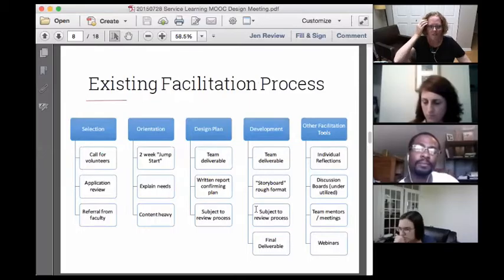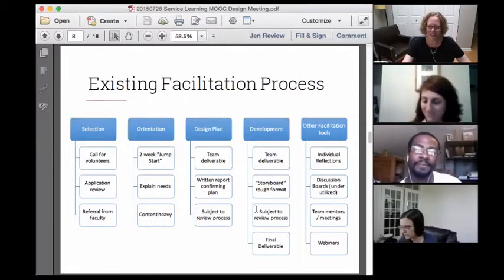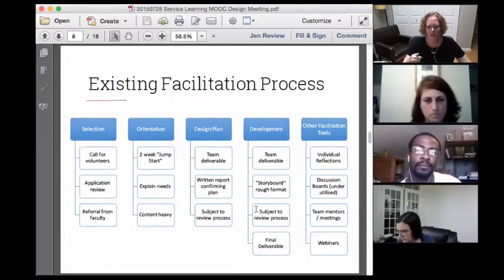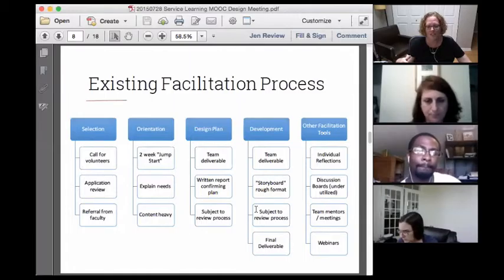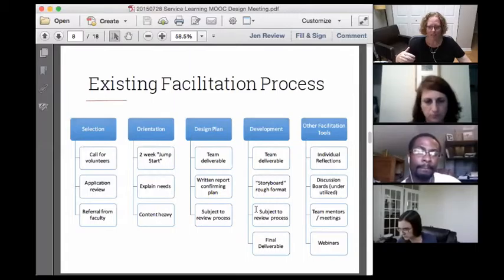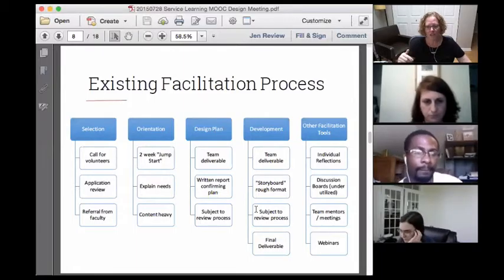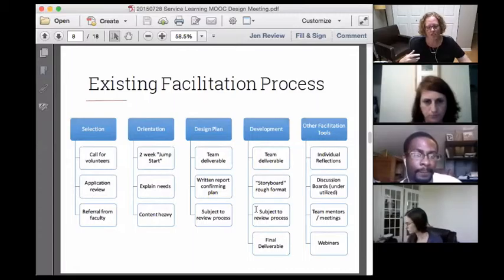In a nutshell, we selected students through a call for volunteers. Once the cohort was selected, they went through a two-week orientation, very content heavy — understanding the design needs, constraints, and who the learners are. They were then asked to prepare a design plan as a small team of two to three designers. They turned that into a prototype, which was evaluated. Feedback from the client then turned into the final deliverable. This whole process took about 15 to 16 weeks.